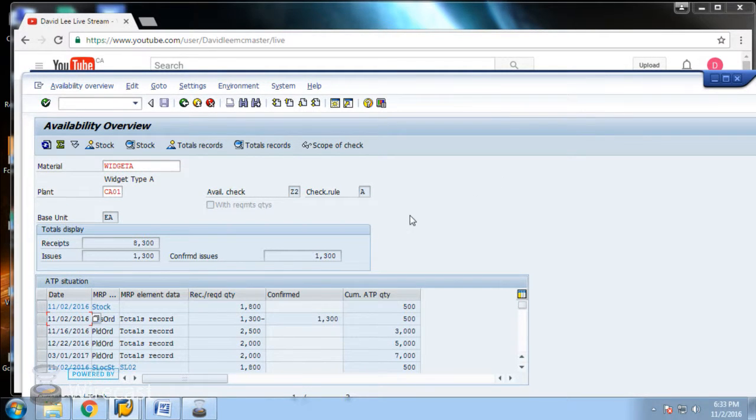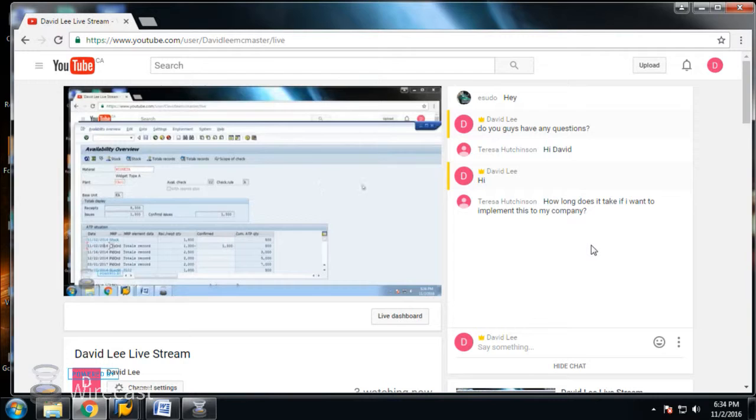And of course, when I said a year, that included a lot of business meetings with the stakeholders to make sure that we got the requirements correct. We configured and developed the system. We loaded all the master data. We went through rounds and rounds of testing just to make sure the solution met the requirements. And also we had training and go-live support. So all of that is already included in the time that it took.